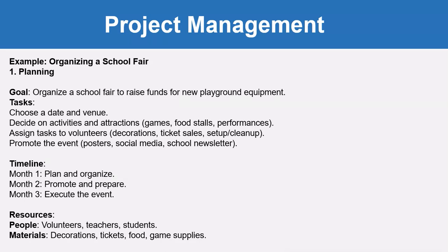Assign tasks to volunteers, such as decorations, ticket sales, setup, cleanup, etc. Promote the event through posters, social media, YouTube, Facebook, the school newsletter, etc. Then decide the timeline: in month 1 we will plan and organize the fair, in month 2 promote and prepare, and in month 3 we actually execute the event.